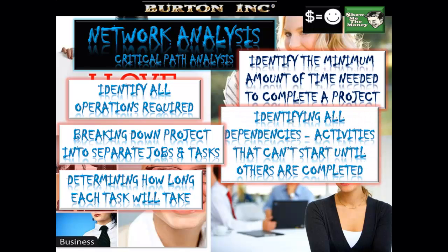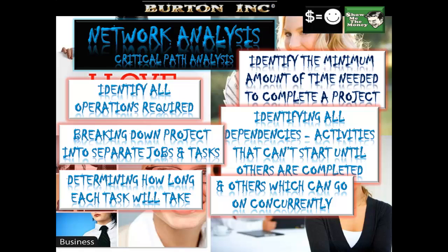Identifying all dependencies: dependencies are activities that can't start until others are completed. It's impossible to build a house until you've got the foundations laid. And we need to identify also those tasks which can be performed at the same time, or concurrently.